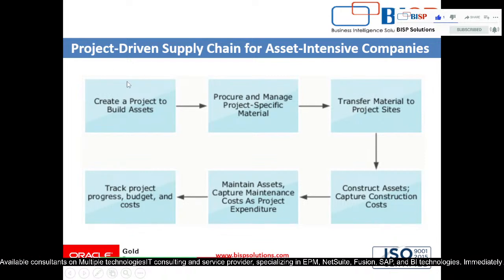So the corporate plan. First, we have to start with the corporate plan, right? That outlines what asset will be built with their location, schedule, and the budget, right? After that, this corporate plan is converted into the engineering, and we can say the construction plan, that contains the bill of material, our project tasks and the budget, right? All defined in this plan, right?